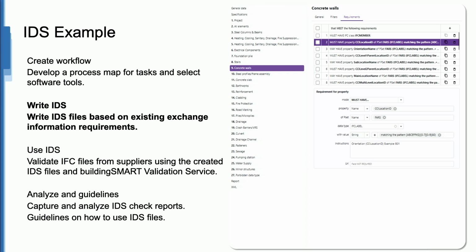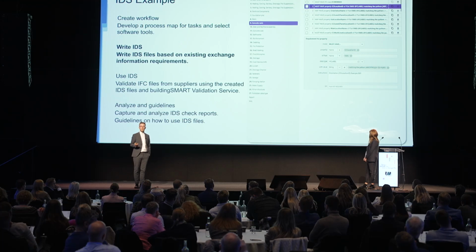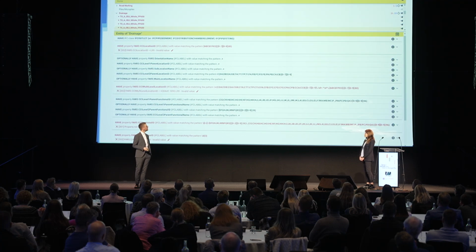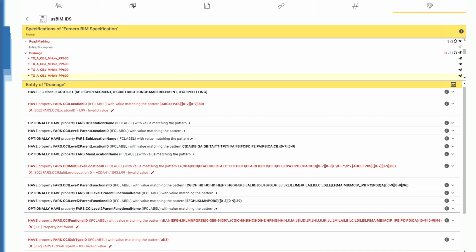And if we look at an example of an IDS test, it could look like this. This is, again, the Ãka software tool, where we can see that in this one the value isn't correct because the letter is L, which is not accepted in Fehmarn's whitelist, and the value is beyond what we want to have in this case.